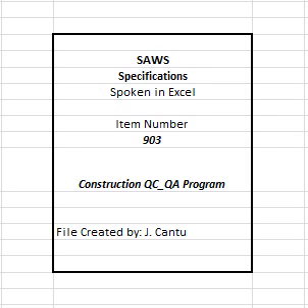When deficiencies are found in the contractor's quality control and/or implementation of the QC plan, many actions can be taken depending on the circumstances. Such actions may include, but are not limited to, improving the QC plan, correcting deficient management, removing incompetent QC personnel, correcting defective work, refusing to allow work to continue in defective areas, and/or disallowing payment for the defective work. An aggressive and effective application of the contractor's QC plan can minimize or eliminate the need to take these actions.